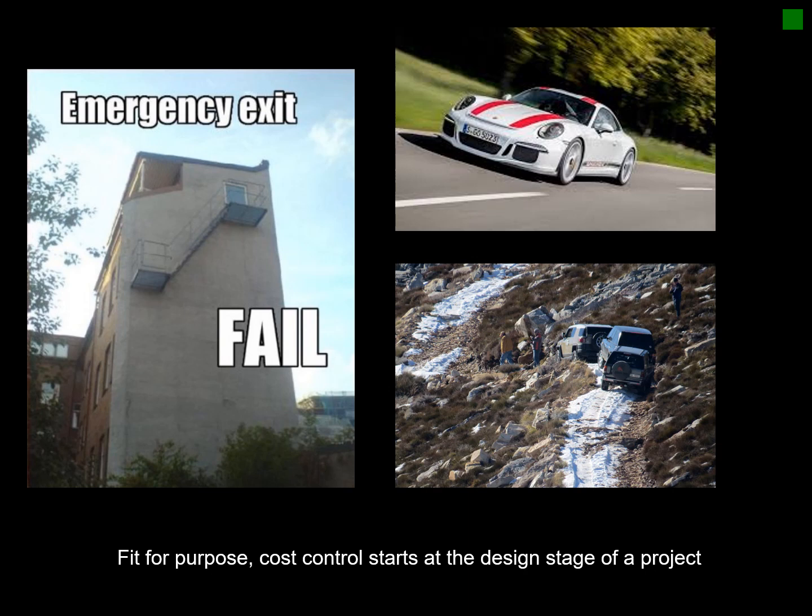It doesn't matter that you have a building standing, but if you can't sign off the electrical installation or the mechanical installation or the ventilation also, or in this case the fire escape, which is required for buildings of this size, then the whole project can fall flat because of it not being in the design and within the budget. So one has to think about everything before you actually kick off the project.